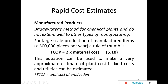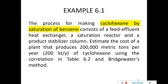The Bridgewater method is only suitable for chemical plants and does not extend well to other types of manufacturing. For large-scale production of manufactured items of more than 500,000 pieces per year, a rule of thumb is to use two times the material cost. These equations can also be used to make a very approximate estimate of plant cost if fixed costs and utilities can be estimated. TCOP refers to total cost of production and is only applied for manufacturing.